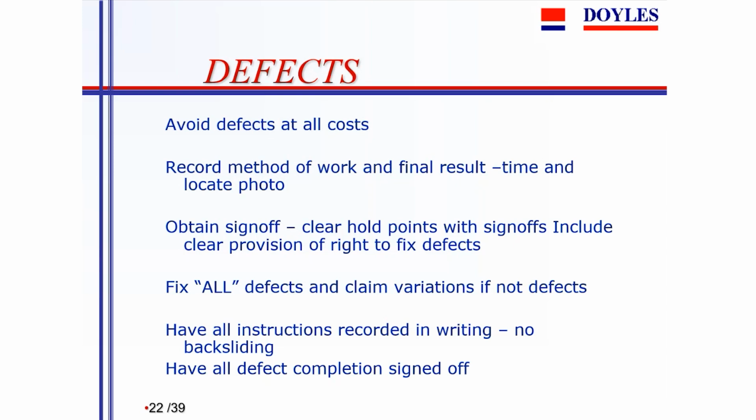That way, you end up with a limited dispute at the end as to the 20% of variations that were unreasonable. You don't have a dispute where the principal contracts with another contractor to carry out the defects. That other contractor, sensibly, to preserve his own position, spends twice or three times the amount on fixing the defects. And then there's a real dispute developing between the principal and the original contractor.